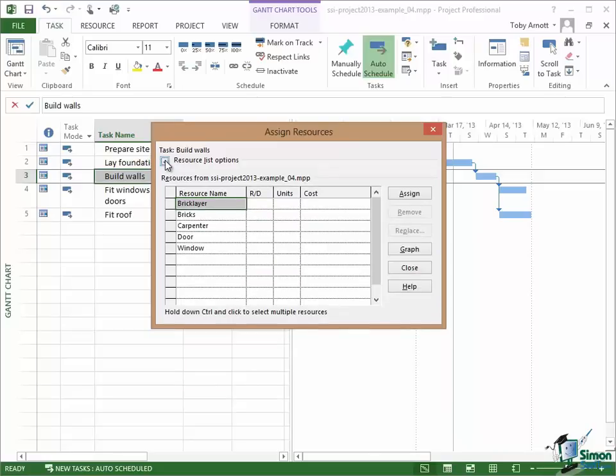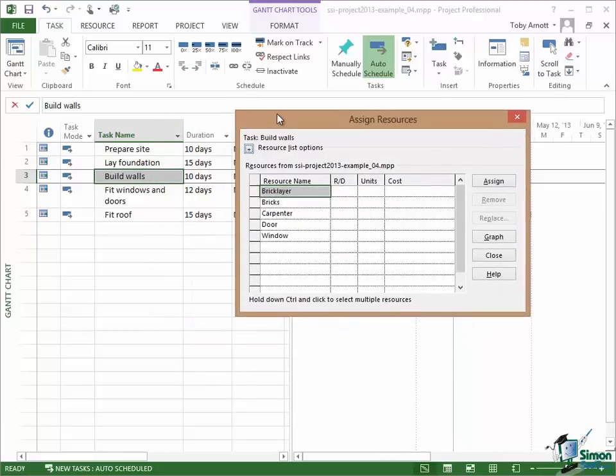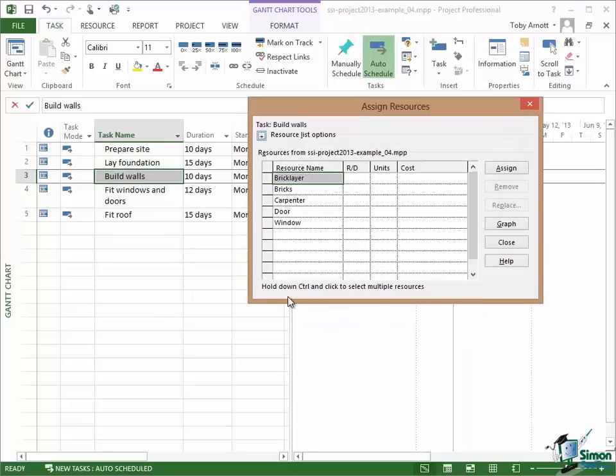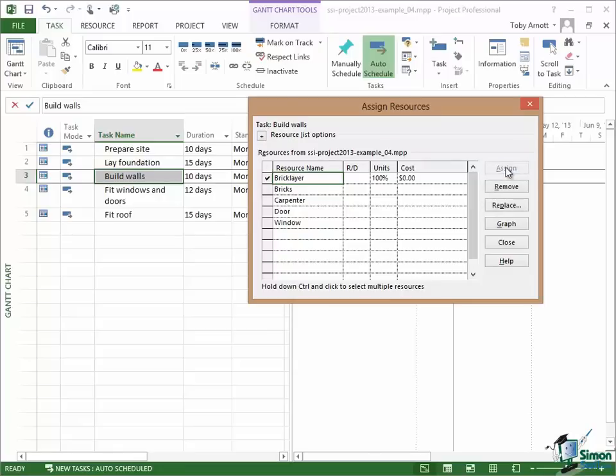For the moment, all I want to do is to allocate the bricklayer to the task of building walls. Now the very simplest way of doing that is having selected the bricklayer is to just click on the Assign button. And what happens if I just click on Assign is that the bricklayer is assigned 100%. That means one bricklayer and depending on the cost figures, the cost of using the bricklayer on that task is indicated here.